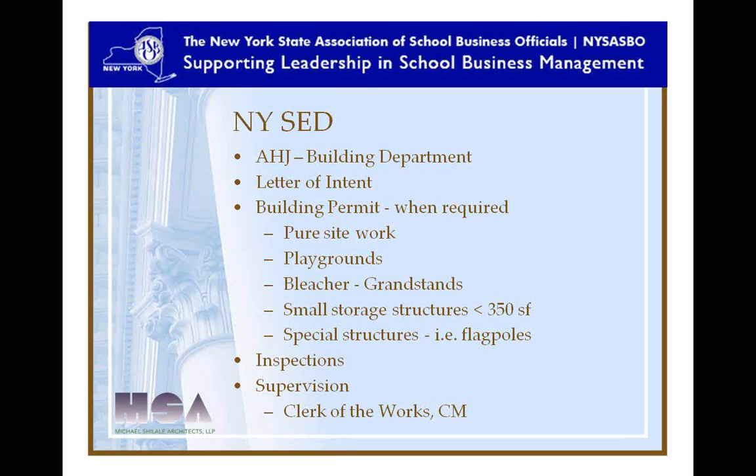And in one instance, one of the buildings, a demonstration building, wasn't even legalized yet as far as SED is concerned. So it's something to be cautious about when you put your project together, that all your ducks are in a row, and it's going to be something that we can get approved through SED, which brings us to this next slide. Your authority having jurisdiction, SED, is your building department, and as such, they issue you a building permit and a certificate of occupancy.